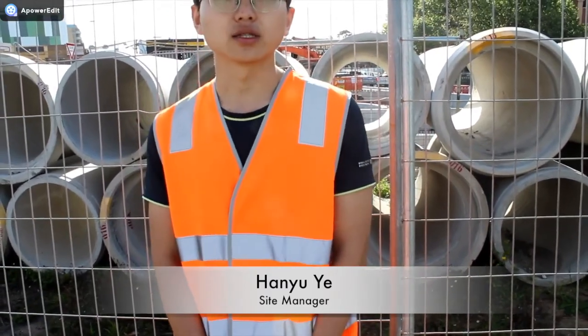Before the work starts, a site manager gets things ready by taking on staff and preparing the site, carefully planning the works to be done and installing temporary offices for the site staff. While the work is taking place, the site manager will monitor the progress, oversee delivery of the materials, carry out safety checks and sort out any problems which could hold up works as they arise.